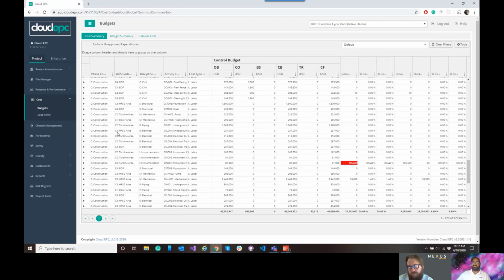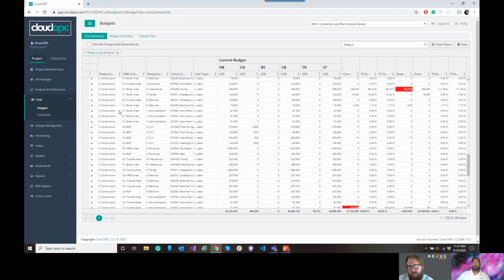And CEL001L would have represented Hersig area underground electrical duct banks. By parsing those out into very specific columns and creating what we refer to as the Big Five, we now have the ability to quickly aggregate data based on that intelligent nomenclature.